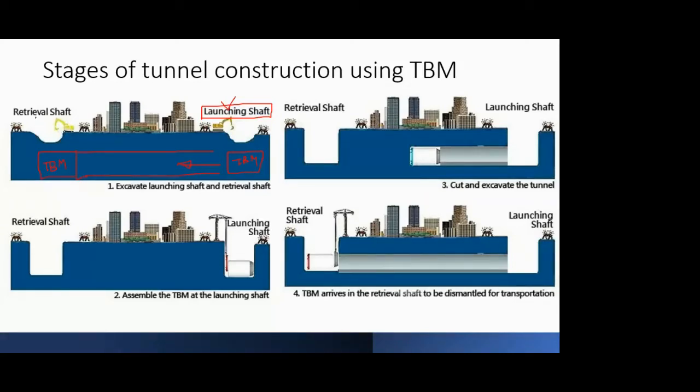So again you will excavate one more shaft at the end, that is known as the retrieval shaft. Retrieval, as in taking the TBM back to the surface. Okay, so you have a launching shaft and a retrieval shaft. So excavate the launching shaft and retrieval shaft. That is the first stage.